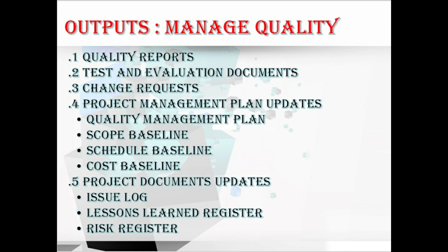For project management plan updates, we have the quality management plan, scope baseline, schedule baseline, and cost baseline. The agreed-upon approach to managing quality in the quality management plan may need to be modified due to actual results. The scope baseline, schedule baseline, and cost baseline may all change as a result of specific quality management activities.